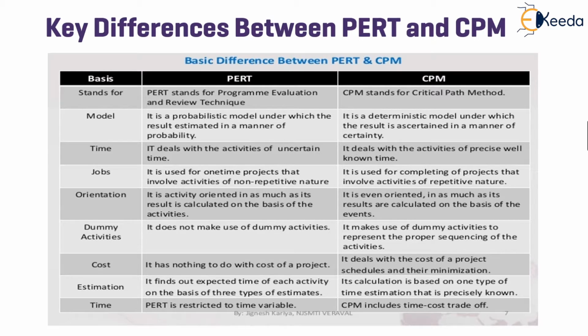CPM can be used for completing projects which are repetitive in nature. Orientation: PERT is activity oriented, whereas CPM is event oriented. PERT does not include any dummy activities. CPM makes good use of dummy activities to represent proper sequencing of activities.